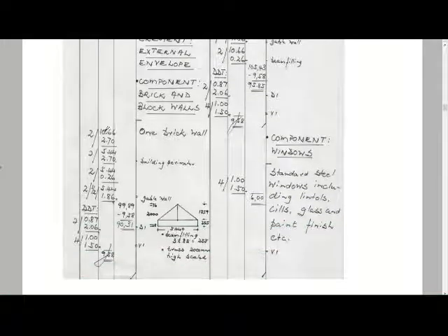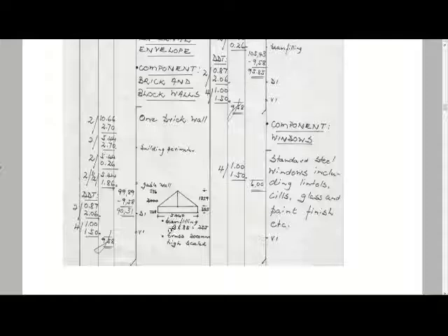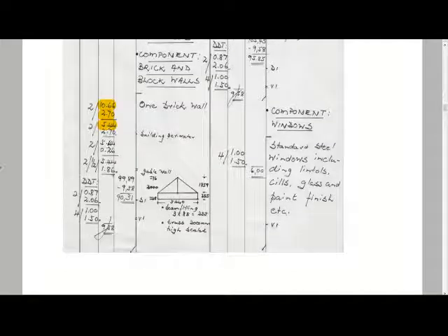In here again, here is our gable walls, and here you can see where they actually applied the trigonometry to it, and you will see some certain deductions. So you've got your different wall lengths times the different heights. The external walls are 2.7 meters high. Here you will see a 0.026, which is your brick filling.